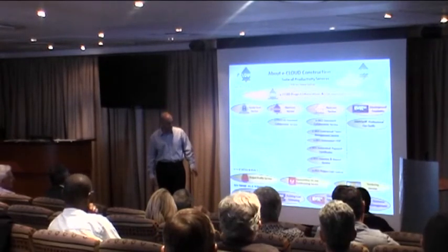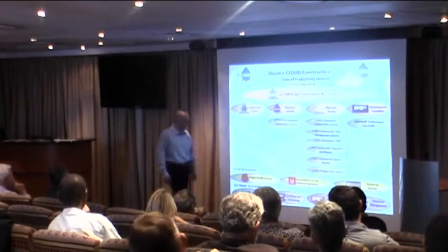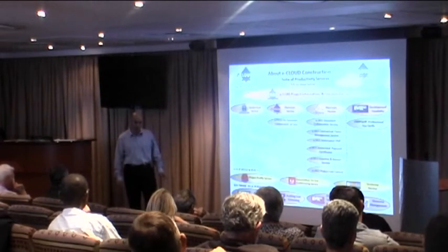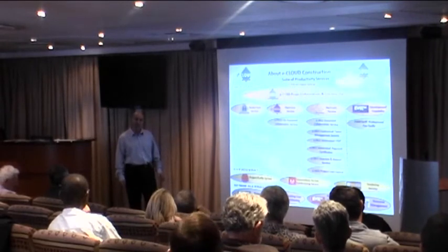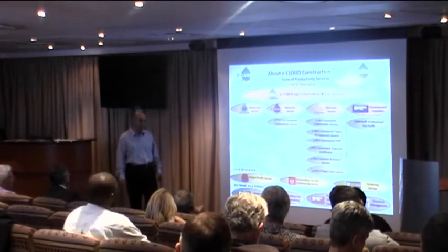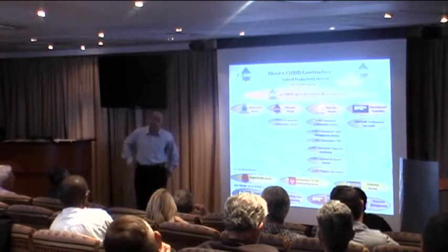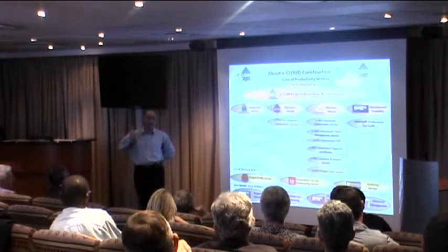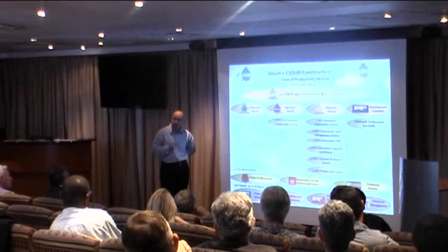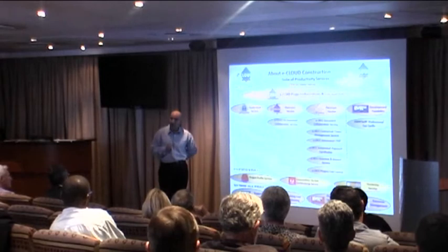From an estimating point of view, we have 2 products that work side by side and link to each other: Quick Est and Quick Quantities. Quick Quantities is an electronic means of measurement, meaning you import your drawing in an electronic format and you literally go click, click, click, click, and it will compute the area of that particular room that you've clicked on. It will mark up the drawing, give you your actual area, and compute the perimeter for you.